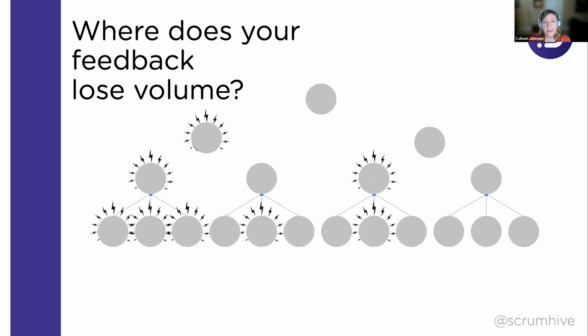So how do we get the right people's attention to hear this kind of feedback? I mentioned the concept of a retro recap. I think that can be a good conversation for Scrum Masters to have, but you have to be careful not to turn that into a report to leadership that the team doesn't get to see. I've seen that backfire too, where there's a digest of the retro that goes up to leadership. I think that violates the team's trust in some ways, and is also probably too much detail. You end up in a spot where there's almost an overreaction to small things.